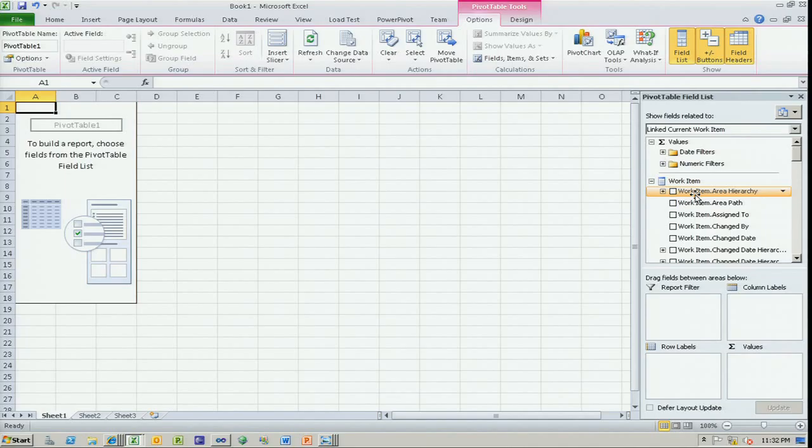I want to know, for my requirements, first you better think of what you want to report on. For each requirement, I want to see the test cases that have passed and failed against that requirement. Notice that is a far different question than for each requirement, show me all of the tests that are currently passing or currently failing. That's the report I've already shown you. The reason you might care is because if you have 400 failures and one pass, it might make you nervous going to production. So I want to know, show me the history of that thing.